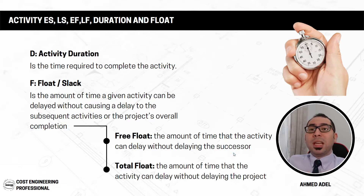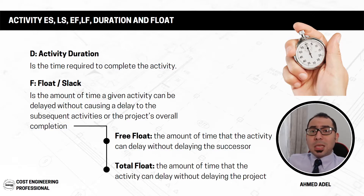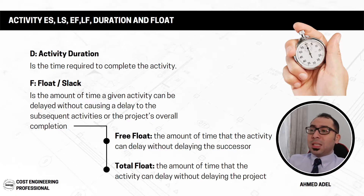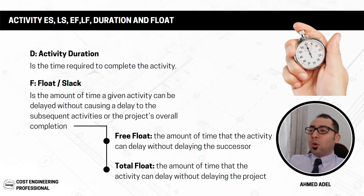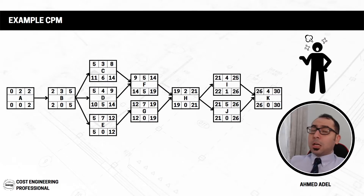Total float is the amount of time an activity can be delayed without delaying the project itself. So for any activity in your project — whether you have 100 or 200 activities — you'll find two numbers: the free float, which is delay tolerance before affecting the next activity, and the total float, which is delay tolerance before affecting the overall project completion.